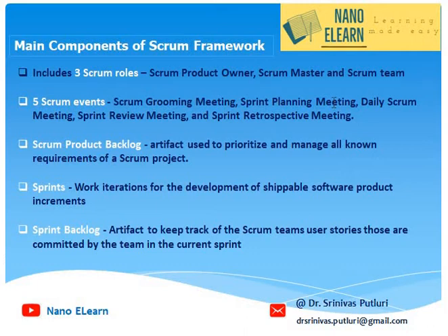It is like a daily call which the team joins for 10 minutes and they discuss 3 points: what they have done yesterday, what they are going to do today, and if there are any impediments or blockers that are stopping them from proceeding.